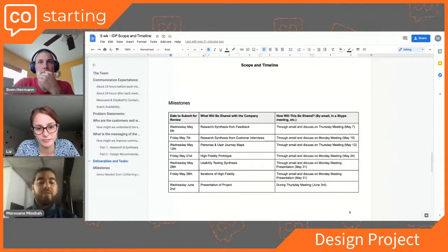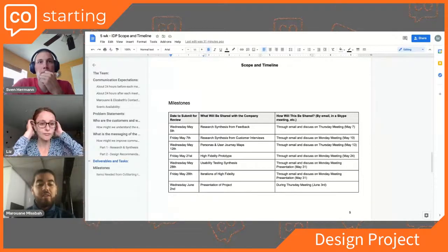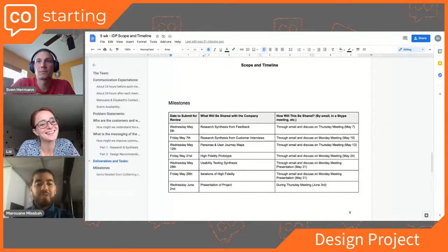Friday, May 21st, we'll have the high fidelity prototype, which honestly I'm really excited about. We'll go through that and discuss it with you on Monday, May 24th. Then Wednesday, May 28th, we're going to do some usability testing and synthesize that, and we will send it to you to talk about on Monday, May 31st.